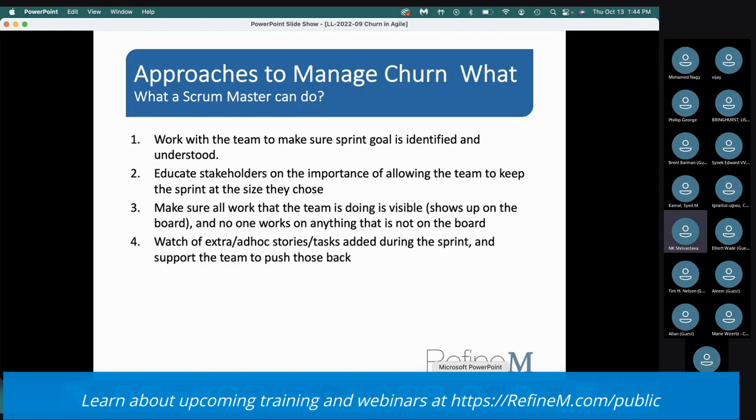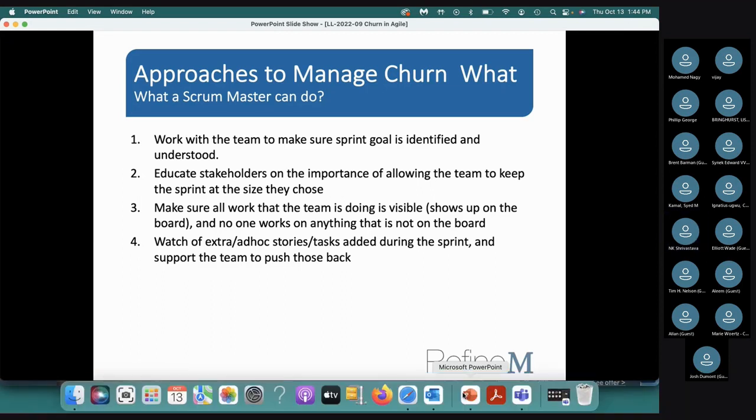So many times when teams start working as an agile team, it is a common understanding that we can change very quickly, and the team should respond to us very quickly. That's the mindset, because we are agile, right? That is correct to the extent that in Scrum you can respond to new requests coming in after this current sprint is over. And if you think that 2 weeks is a long period of time to push an incoming request, then you should start thinking about a shorter sprint, maybe 1 week.